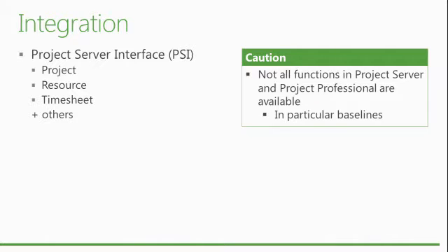It's been true in all the versions, and it hasn't changed across the board. You can do some things around that, so if you're clever with the project client and customization, I wouldn't try and automate the project client behind the scenes. That's a very painful approach, and certainly not a supported approach. But you can add VBA to your project client to provide things like a notification. So you could do something like access the PSI, add maybe a flag into your project information level field that says, I want to baseline this plan now.